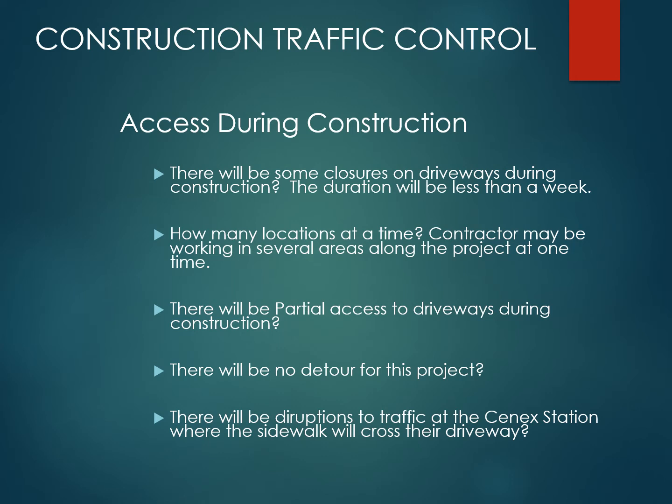The contractors that are doing these projects usually do a very good job of working with the property owners to make sure that they have access in and out of their property at all times. There may be times when access may be restricted, or the contractor may ask you, if you want a vehicle out, you should get it out now because we're going to pour concrete. So there will be some closures of driveways or partial driveways during construction.